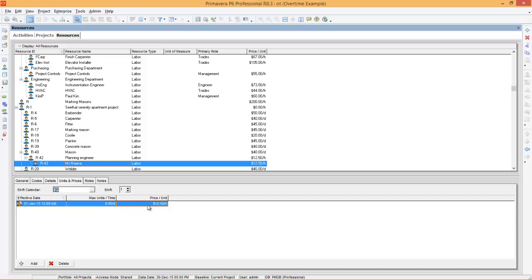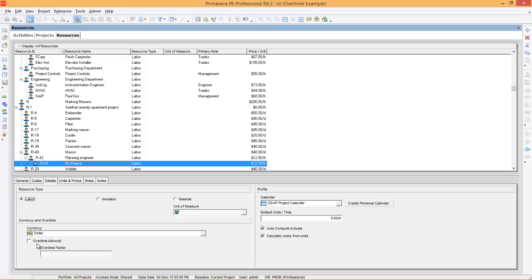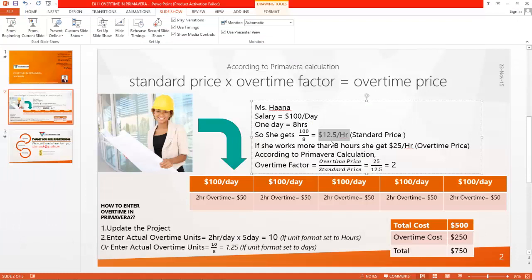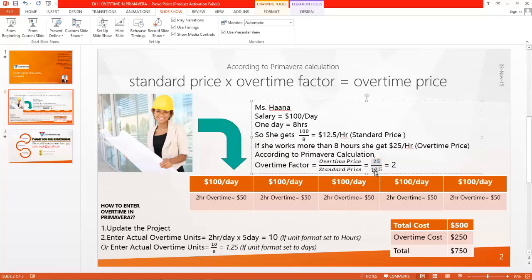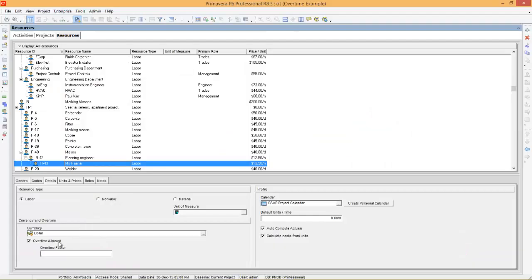After setting maximum units and price per unit, you can go to the Details tab. You can say overtime is allowed and you need to enter the overtime factor. The overtime factor is overtime price divided by standard price. In our example, overtime price is $25 — if she works more than eight hours, she will get $25 per hour — divided by standard price $12.50, which makes 2. So you can enter the overtime factor as 2.